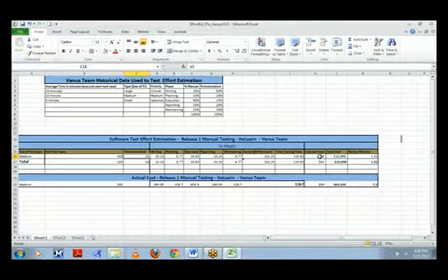After completing the test activities, our team went back and came up with the actual cost, how much it took. Unfortunately, our actual cost is way more than what we estimated. We think the historical data that we used is not current data. Maybe it has been used for a long time. Maybe we are going to revisit this problem once again and see how we can improve our estimation.